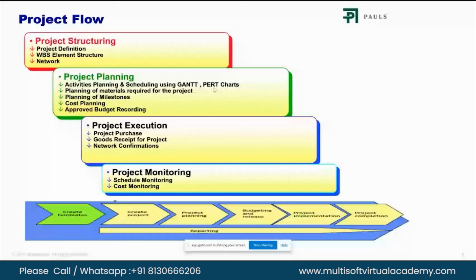Say your milestone is set at the first year of the project. Once that milestone is completed, then only your budget will be infused for the second year. That can be done, but we do not have this option in budgeting. The option that you have is overall budgeting or annual budgeting. You do not have milestone budgeting for this.